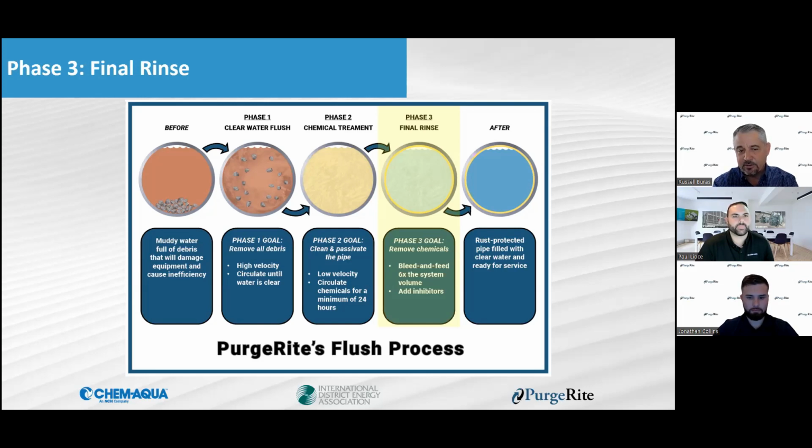You need to think about that when you're rinsing. And again, that's why really contemplating, where's my makeup water coming from? How much can I get? And can the discharge equally handle that amount?